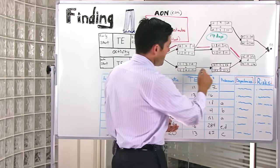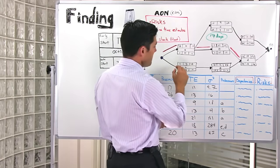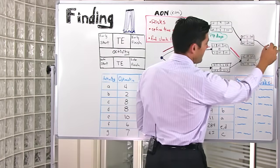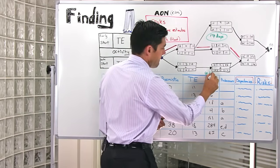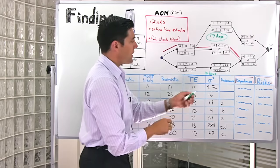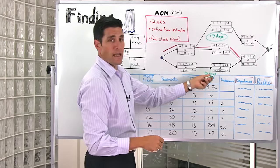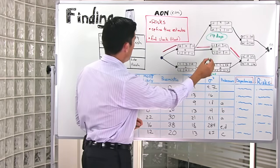Again, let's look at this bottom path. Between paths B, D, F, and then finish, I've got six days of slack. Quite simply, it's 13 from 19 days.